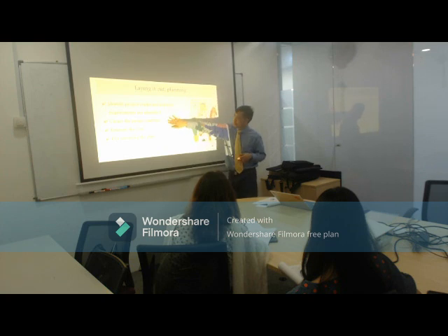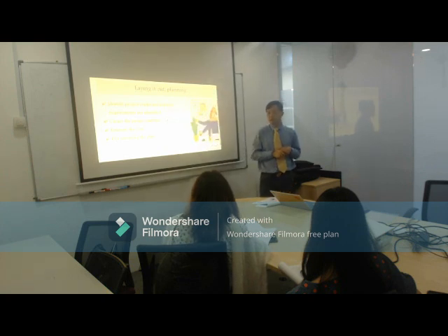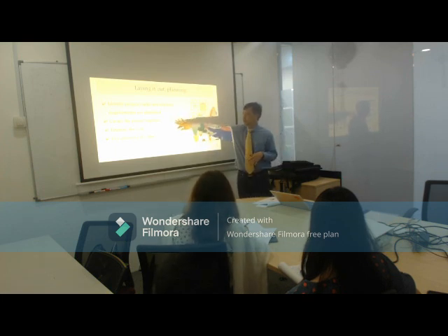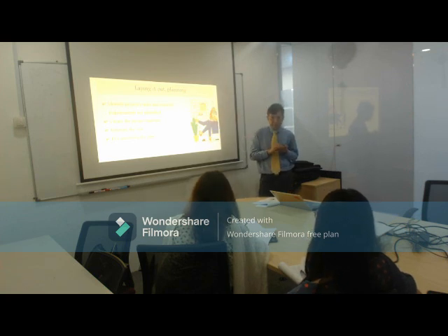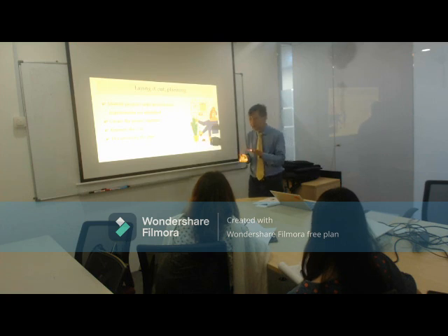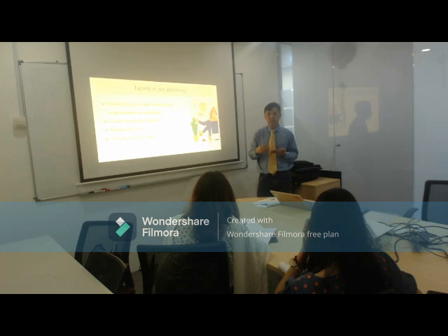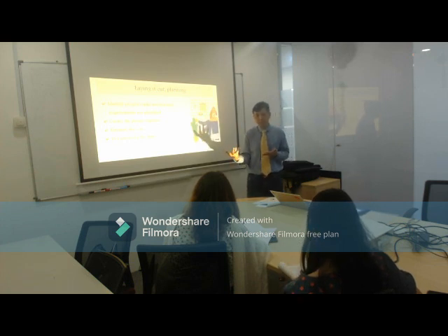With that, somebody will tell the tellers, okay, within the next 1 week, we have a project timeline. For example, they have to mention: prepare the software, prepare the training material, training notes, arrange for the trainer, arrange the room or time.